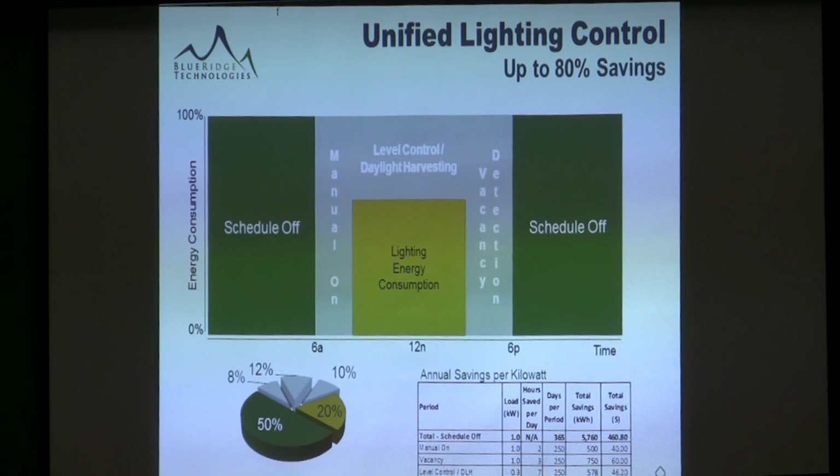When I look at applications out there, if it's new construction, they're probably on lighting control, if they're meeting the energy code requirements, probably around $1 in total install cost, with everything probably around $1.50 to $2 a square foot. I've seen retrofits as low as 39 cents a square foot, so it's kind of all over the ballpark there. And I've seen gold-plated stuff all the way up to $6 or $8 a square foot. So there's quite a range when it comes to lighting controls, and it really depends on what they're trying to drive at.